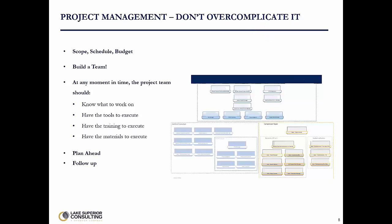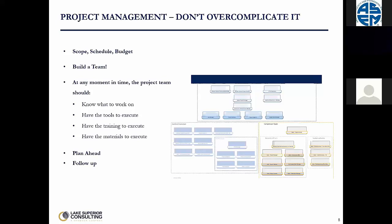Project management basics — don't overcomplicate it. It's all about scope, schedule, and budget. Your number one task is to build a team that's going to be effective, knowing that team is going to have some folks who come in for a while, whose utility is going to expire, and they're going to move out of the project. A good example might be the environmental consulting firm for air permitting — that group will come in, analyze the situation, get the construction air permit from the regulating authority, get the paperwork in line, and then once their utility is in place, they move on to another project.